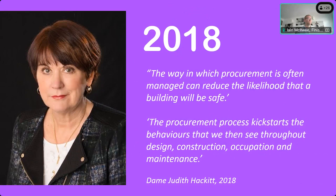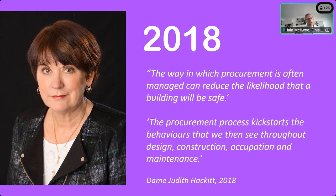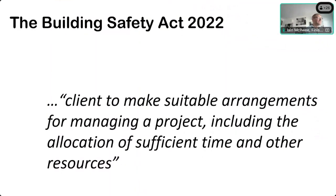In 2018 the Grenfell tragedy led to the Hackitt Review, which again repeated much of what Latham and Egan had said, tracing problems back to procurement. The way procurement is often managed can reduce the likelihood that a building will be safe, and Hackitt made the point that procurement kickstarts the behaviour we see throughout the design, construction, occupation and maintenance process. The Building Safety Act now makes it absolutely clear: the client must make suitable arrangements for managing a project, including allocation of sufficient time and other resources.